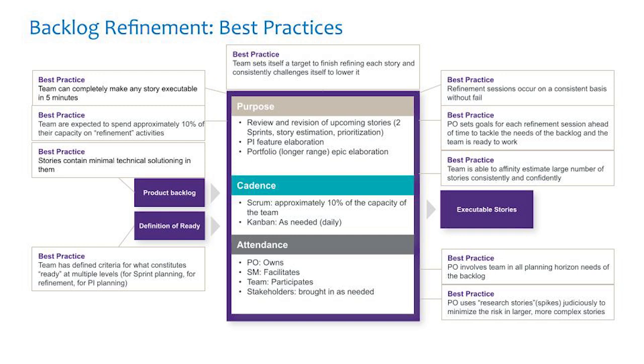A lot of these same tendencies that we had in the sprint planning meeting apply in this session as well. It's not best practice, but there are some Agile groups that we've worked with that prefer to have this session and the sprint planning session at the same time to simply eliminate a ceremony. It gives individuals back 2 or 3 hours a sprint. Again, that is not best practice. The team has a dedicated amount of its time to this activity, and again, best practice is 10%, but it will help overall production when you have a good list to go off of.